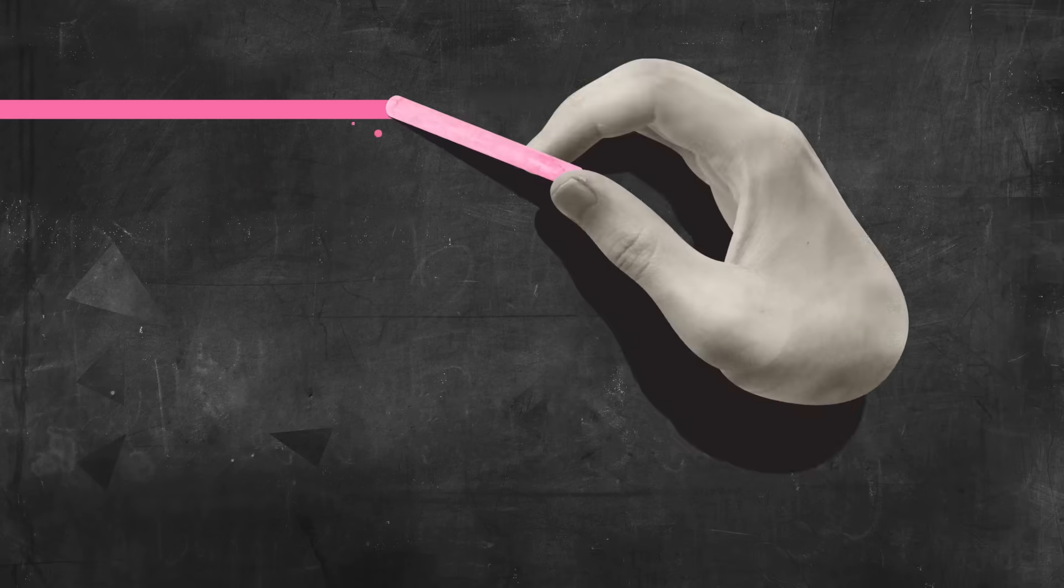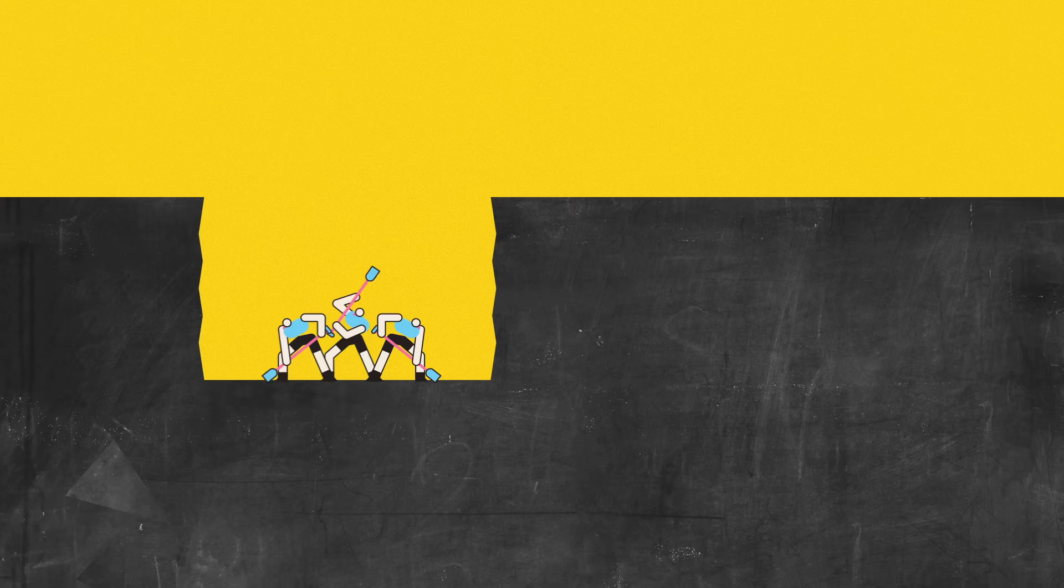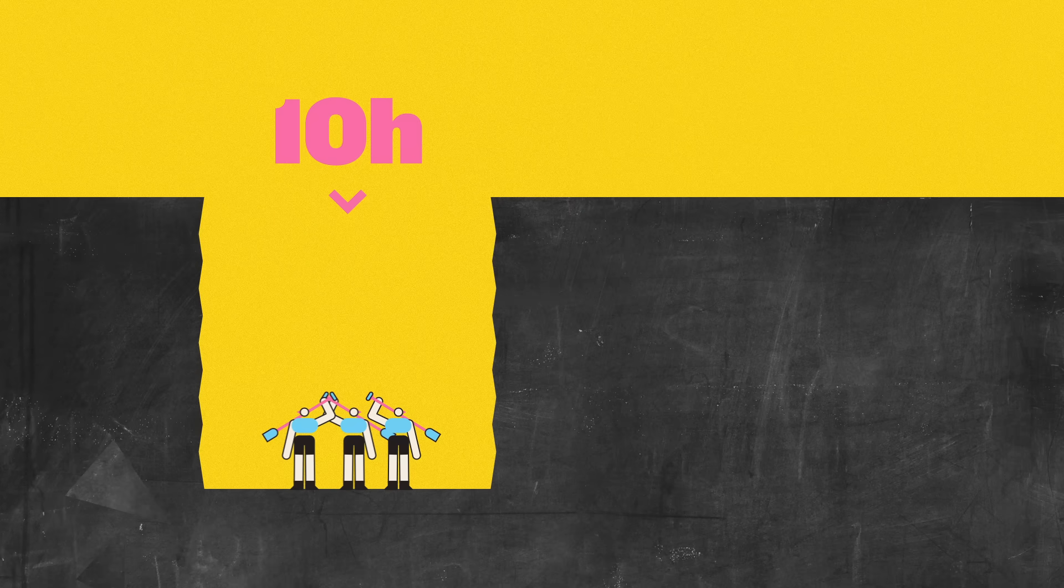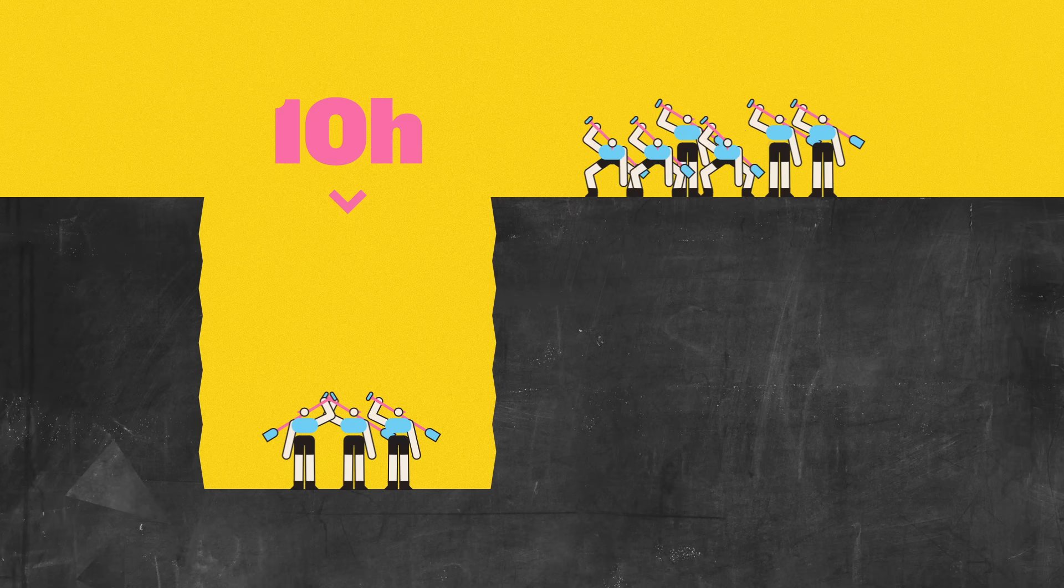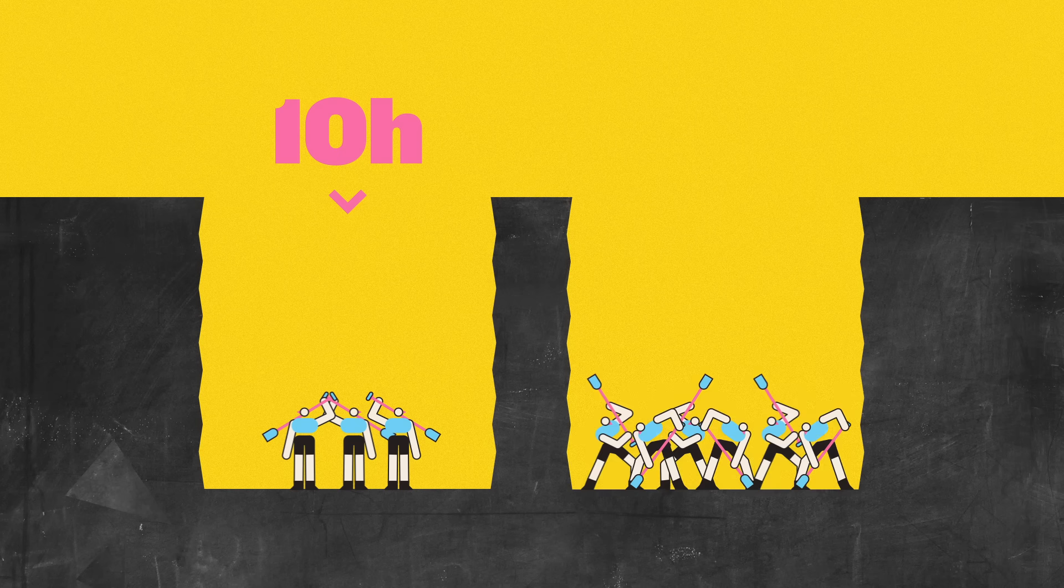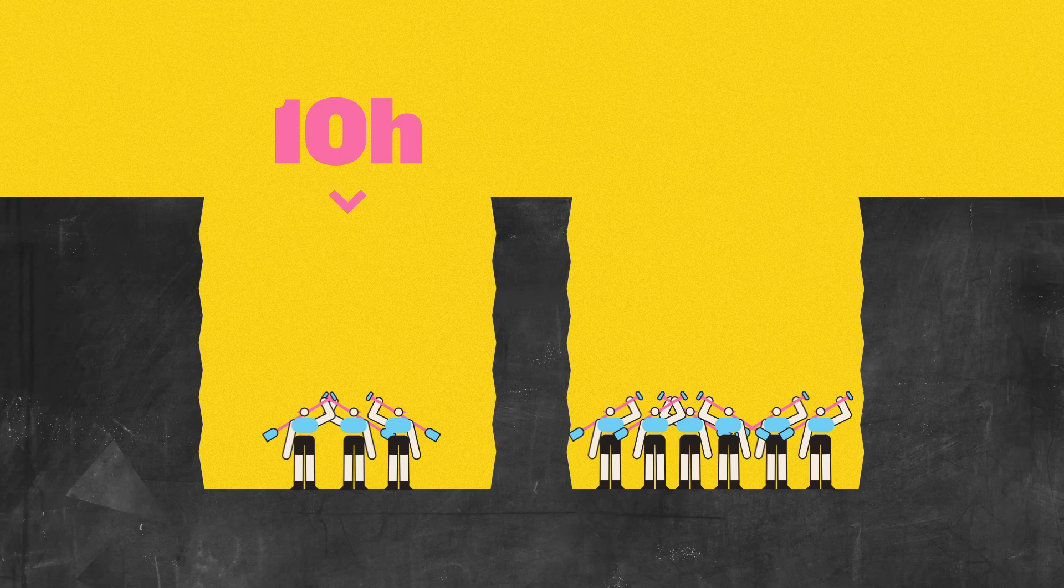Quick maths problem for you. If it takes three workers ten hours to dig a hole, how many hours would the same size hole take six workers to dig? Twice the manpower equals half the time, right? Five hours. Easy.